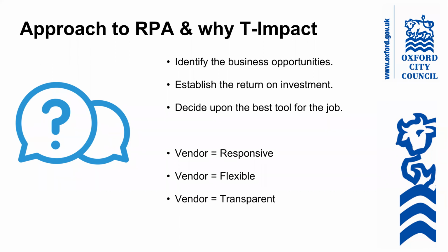We shortlisted down to 3 organizations, they presented, and we walked away from it from a business perspective not happy at all. And in fact, we pulled the procurement at that point. Why did we do that? Because we hadn't really got a clue as to what we were looking for. You know, we knew that RPA was a good thing, sounded good, all the marketing was excellent, but actually, when it came down to it, the actual cost that hit us in terms of the procurement just blew the business case out of the water, because we approached it the wrong way.